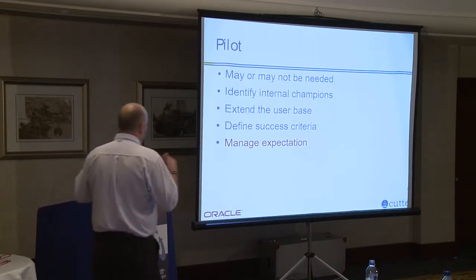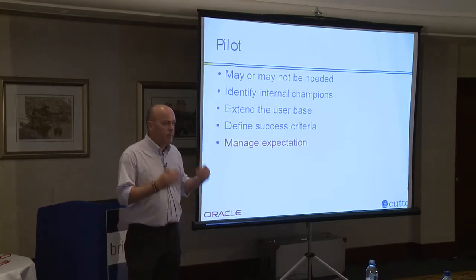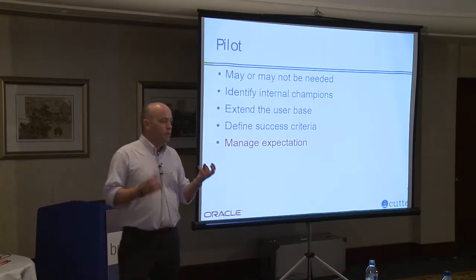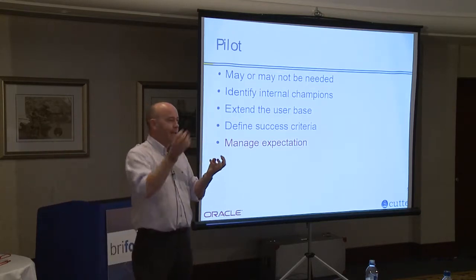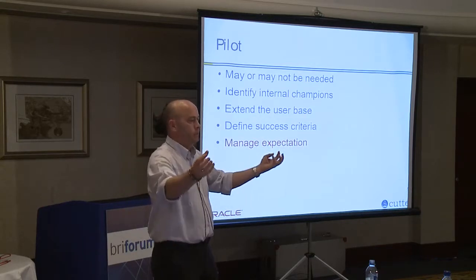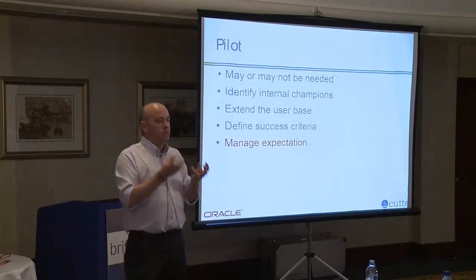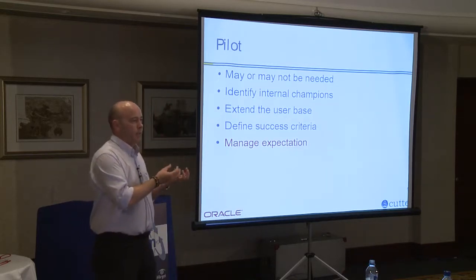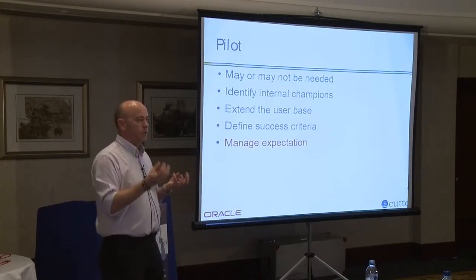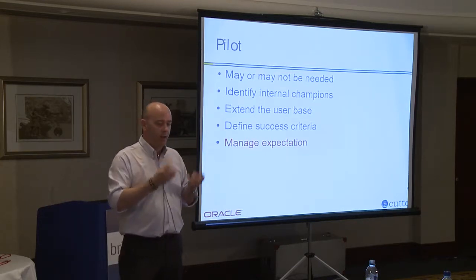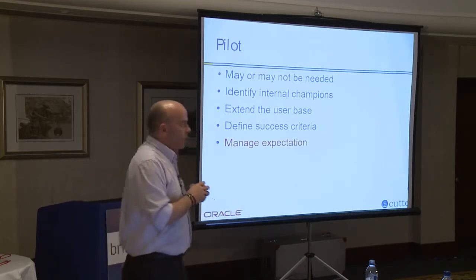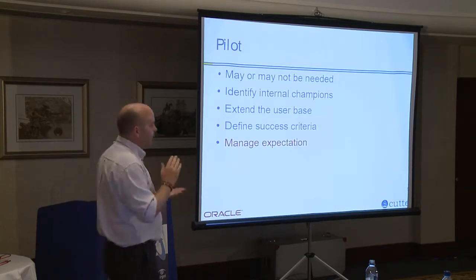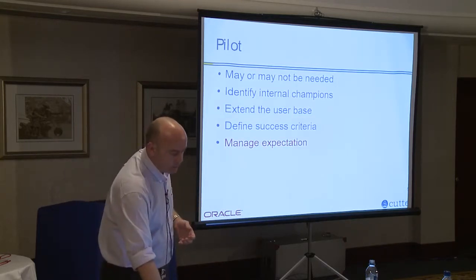During that process, identification of the internal champions. There is a fundamental shift change in the way you're going to deliver your desktop computing. On one hand, you're taking stuff away. You've got to be seen to be giving stuff back. And the internal champions will be the people that drive that to the rest of the user base as well. So identify those internal champions and work with them to assist you with doing the change management. Expectation management is now moving into change management. And you know what it's like when users are given something and it changes, they get a little bit upset about stuff. Again, extend the user base, try and get it to touch as many people as possible. Again, success criteria, manage your expectations.